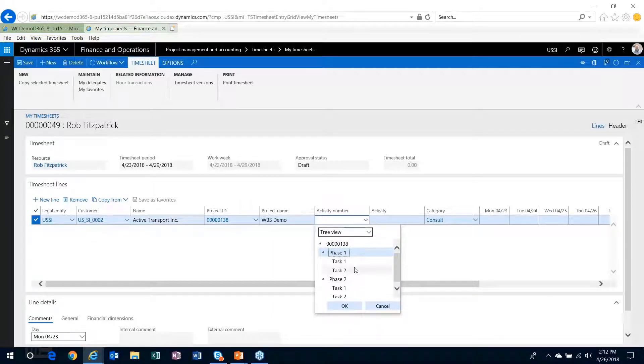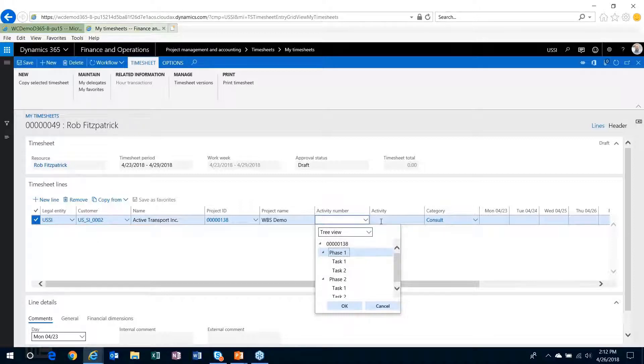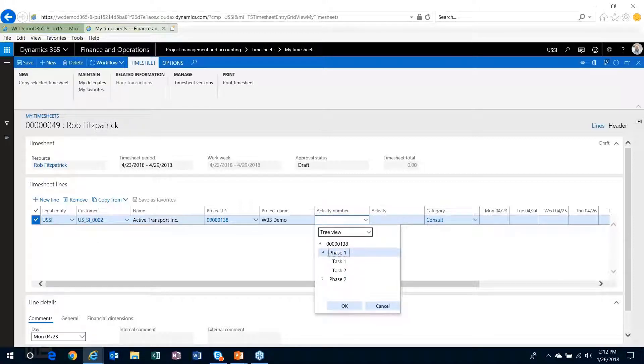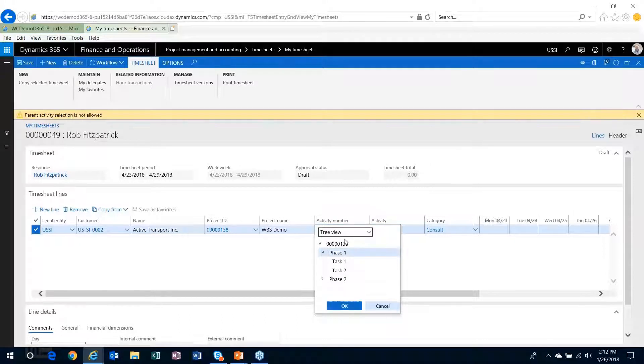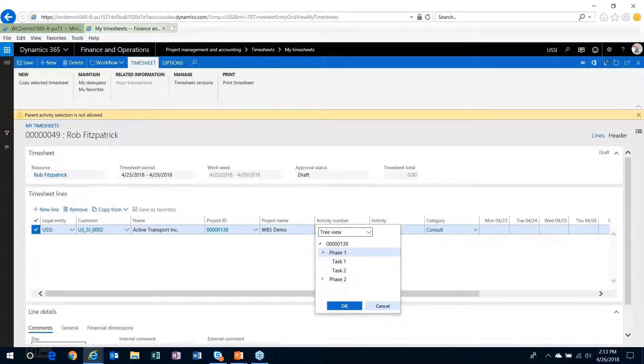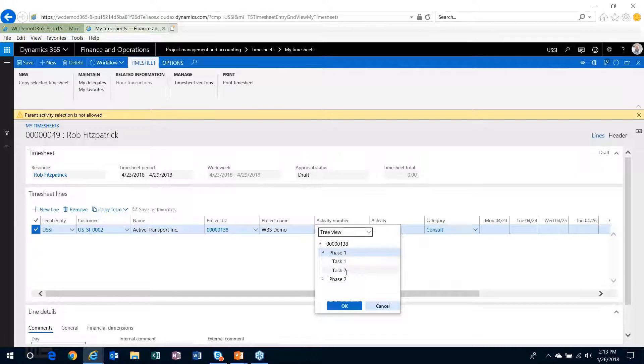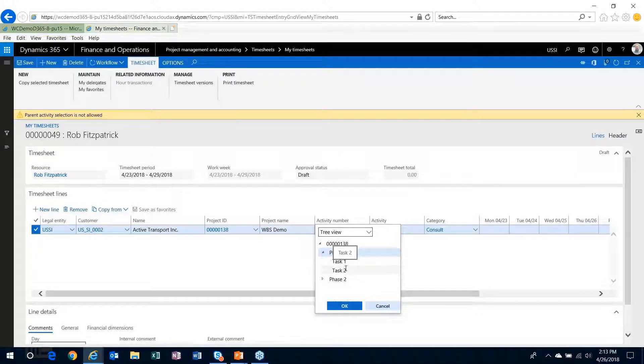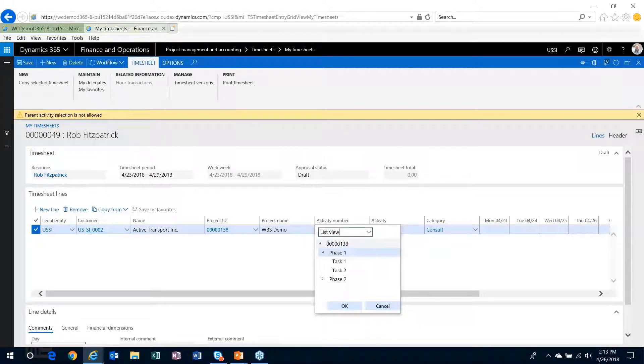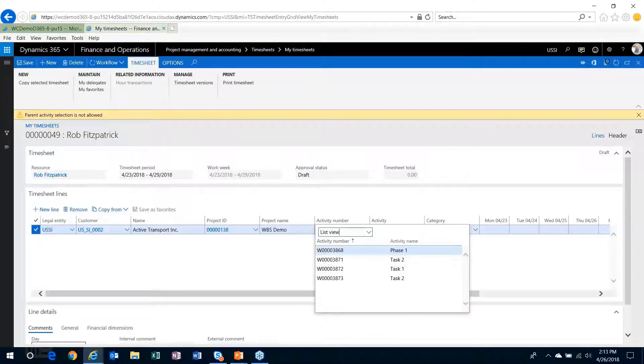So as I mentioned earlier, with the ability to charge, or at least not select parent tasks, the system will ensure that I have to choose the lowest level task in order to charge my time or any project transaction to it. So that validation kicks in as you're selecting from the tree view. The fact that parameter's turned on only shows